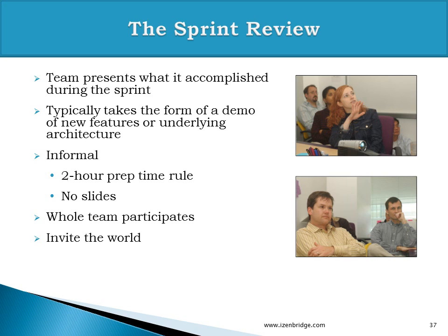This is a ceremony where we invite all the possible stakeholders. So everybody is present, they can comment, and they can provide feedback on the work which the team has done during the sprint. The product needs to be presented by the team. A team member can take the lead in presenting the product, and team members should rotate among themselves for taking the opportunity of presenting. A Scrum Master should not be presenting the product in a sprint review.